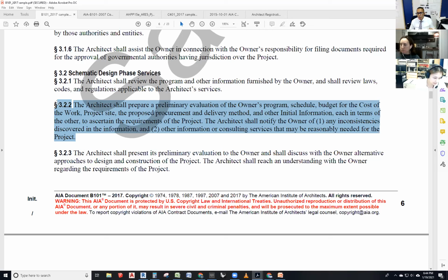That's when we actually look at the geotechnical report and be like, well, you did borings all throughout the site except for quadrant number 1. By the way, we divide sites in quadrants too, and you're gonna see that in programming, Miranda. So quadrant number 1 doesn't have any borings. Like, why? That seems to be the best location for this, just from the get-go, just trying to understand it. And you can ask that, right? Or the other question might be, why don't we have a geotechnical engineer on this project? It seems like there's a lot of wetlands throughout the whole region. We need to have a geotechnical engineer. So that's when you inform it.